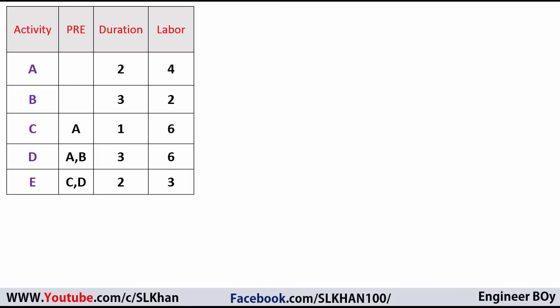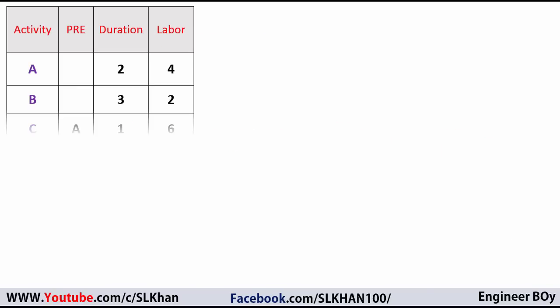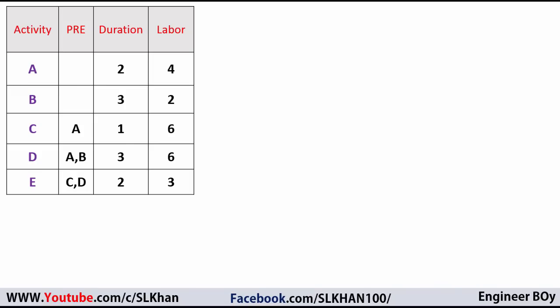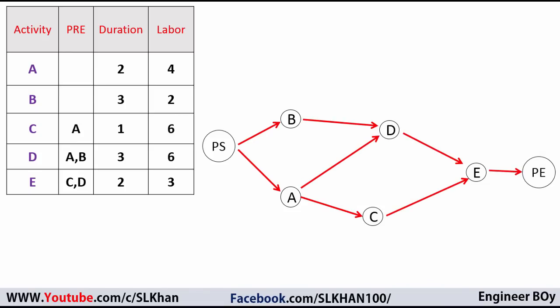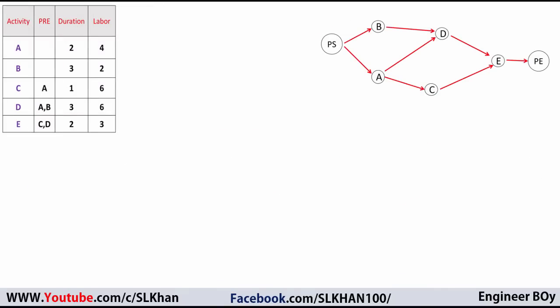This is the same table we just entered in Excel. We have activities, predecessors, durations, and labors. We're going to draw the network diagram from this. Activity A and B start from the project start. Activity C starts after A, activity D follows both A and B, and activity E follows C and D, leading to the project end. If you need to learn how to draw a network diagram, I've uploaded a separate video — the link is in the description below.